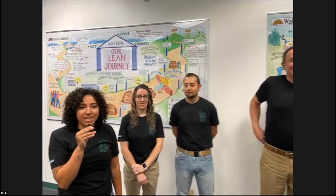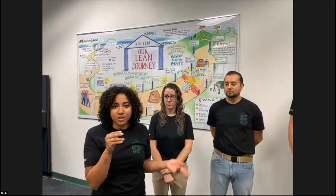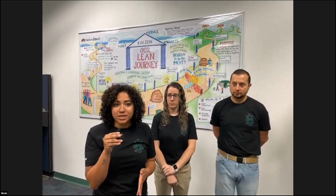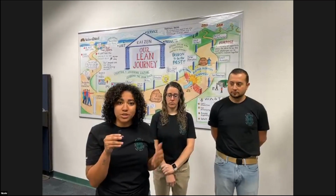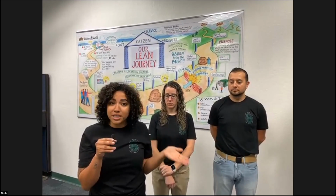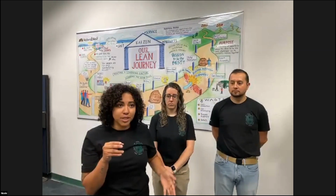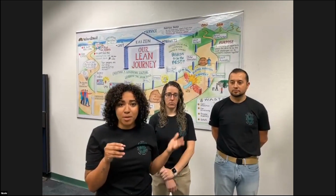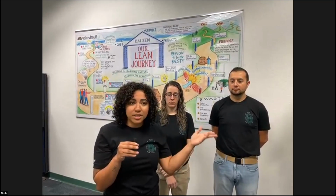So every department has their own stand-ups, whether they're daily or, for us, 2 times a week. And we talk about different problems. One of them is a planning meeting on Mondays, for example, where we plan out our week and talk about how the action items on our schedules are going to go. Then on Wednesday, we regroup and talk about problems, and we have a member of our management team in there. So we bring up problems and get help, bringing things downstream or bubbling them up, so that by Friday, in our Friday planning meeting,